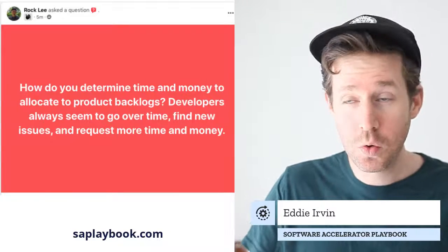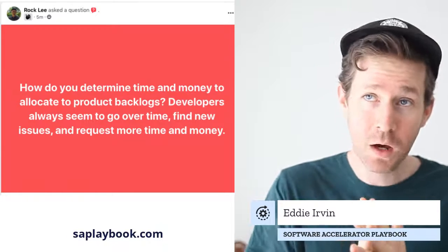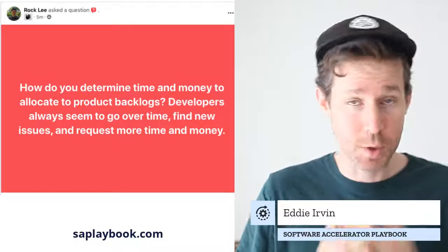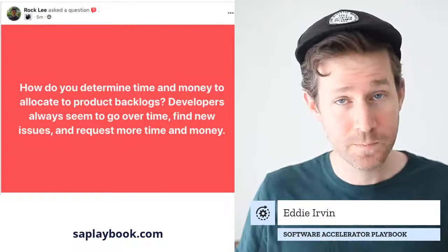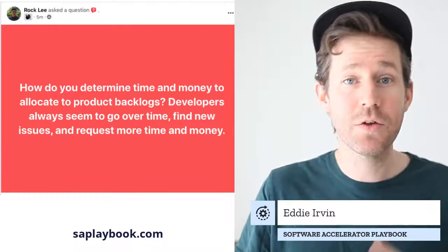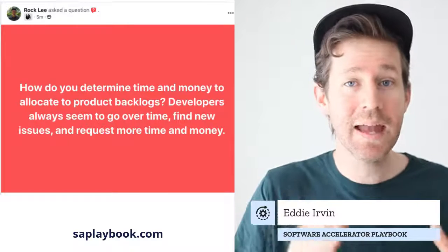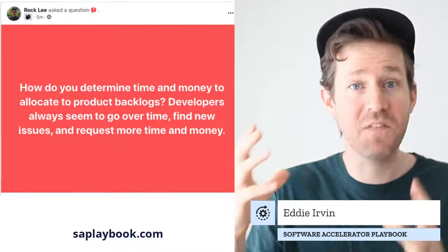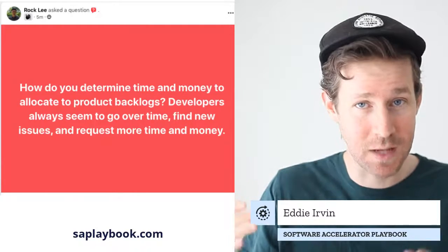Now, you could do potentially one method that I've heard before, where I was told this story by somebody who hired a developer, and that developer gave them a warranty on that functionality for a specific amount of time. So say they're asking for a certain thing to be done, and that developer said, okay, we can do that, and I'll give you a warranty for this amount of time. I'll fix any glitches within that amount of time, and then past that amount of time you'll have to pay.